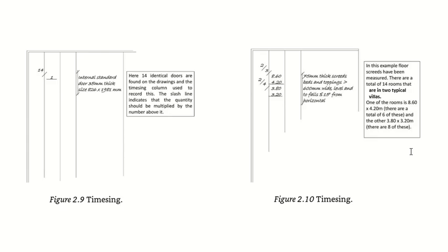This is called detailing. If you write 6, somebody may get confused. He will not know where it is coming from. We want to provide more details, so if somebody wants to check, he can check and understand why it is so much. If you see 6 but you have only 3 rooms, it will become confusing, right?